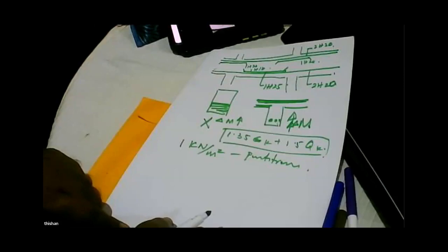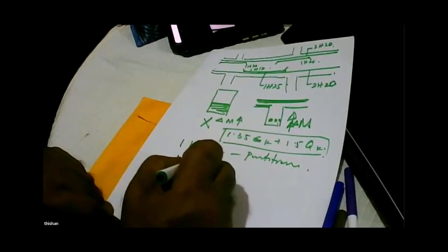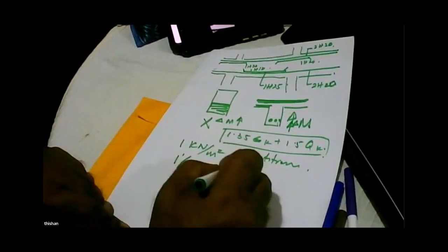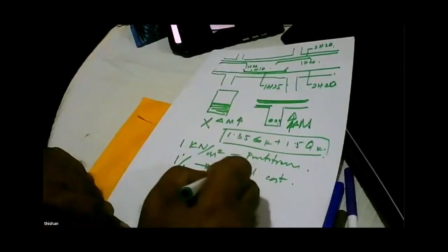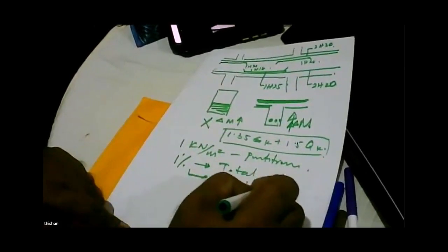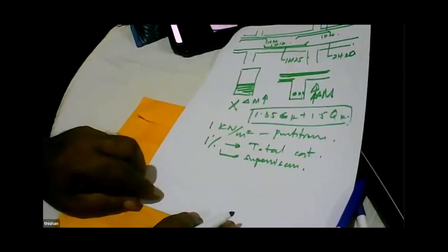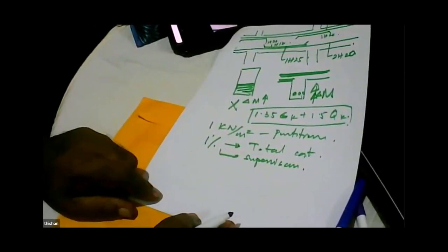And that's what we need from practicing engineers, because your duty is to give the best for the client. What is the reason? For doing some calculations, you are paid 1% of the cost of the structure. So the structural engineer's charge should be 1% of the total cost. Why? Because this includes supervision. Whether you have continuous supervision or periodic supervision, whatever it is, it's in-house supervision. So you should not do any design for less than 1% of the total cost of the project.